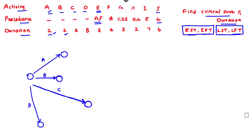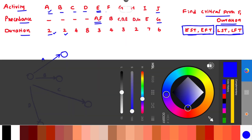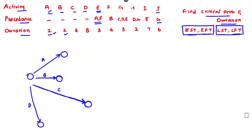Next, we draw activity E. Its precedence activities are A and F. First, we draw activity F — for F, activity B is the precedence activity — so we draw F coming from B. Then for activity E, both A and F are precedence activities, so E follows both A and F.